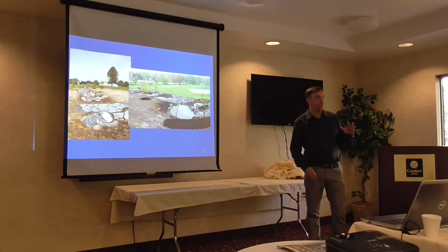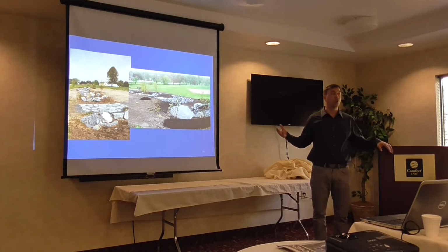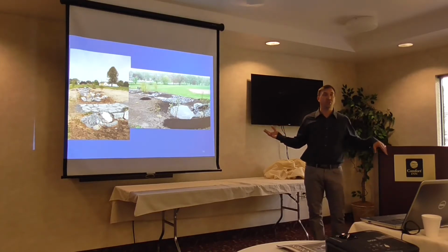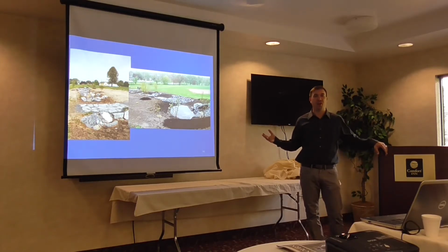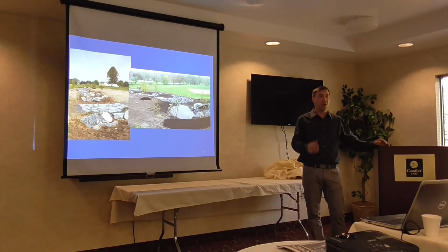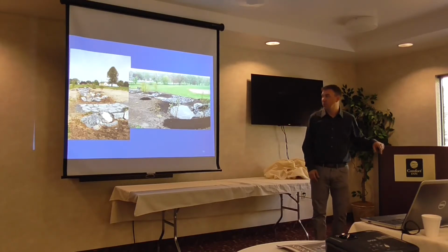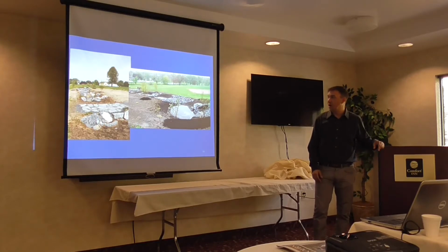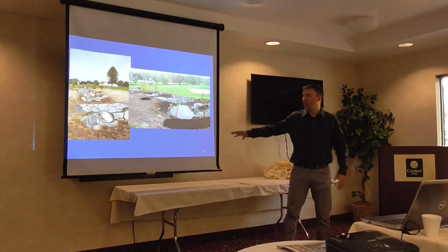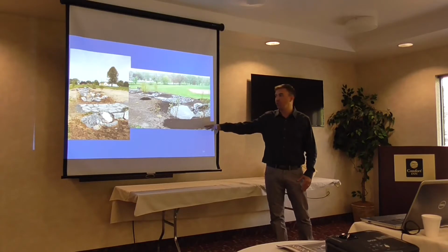Few issues we ran into. We found out that the pool was also connected to this, which was a surprise to the contractors when they were working on a bright, sunny, dry day, and all of a sudden water just started flying out of the pipe. It turned out they were doing some maintenance on the pool and letting the water go, so a little bit of a surprise there, and you're going to run into that. But this, you can see it held up very well, even during rain post-construction.